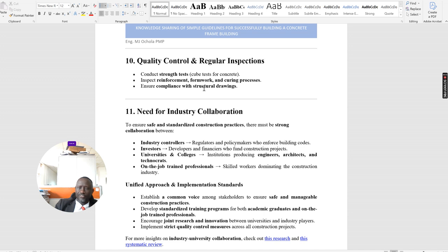Inspection and quality control. Inspection, we talked about these foremen, the different foremen on site. Their role is actually to do that supervision, overall oversight, and then you also have the different leaders within members that you also assign to oversee activities when you are not there as a foreman. These foremen also work under what we call the general foreman. The general foreman is now the one that supervises almost all the activities on site.